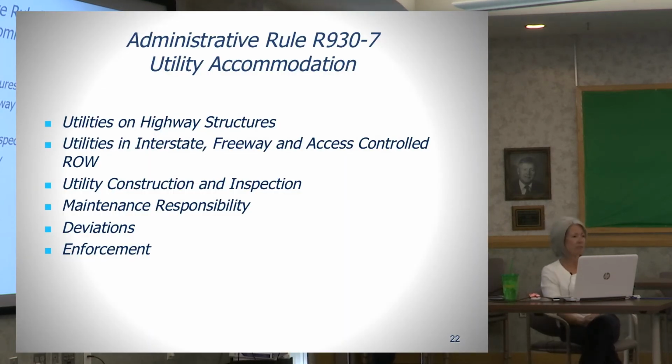The definitive design instructions also include the requirements for utilities on highway structures. If you have a situation where you have an existing one, a proposed one, you're considering one, the Structures Division needs to be involved with evaluating those for load and vertical clearance.